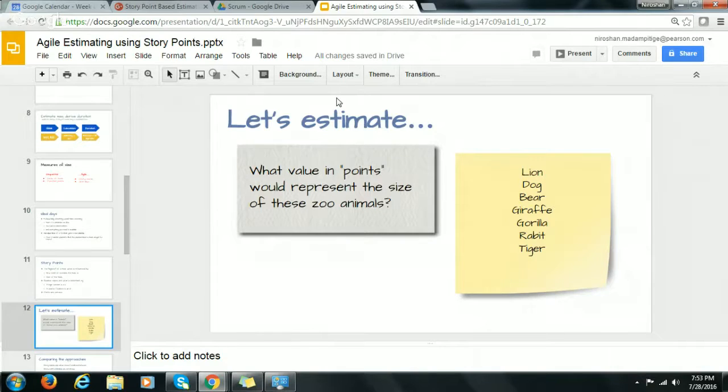Now, what is your estimate? I would say probably 6. In this case, I'm not considering any particular standard index. In Agile terms, when we do relative estimations, there are quite a few standard indexes that we can use. One team could use something called t-shirt sizes. In terms of the size of a story, you just need to figure out extra small, small, medium, large, extra large, etc.